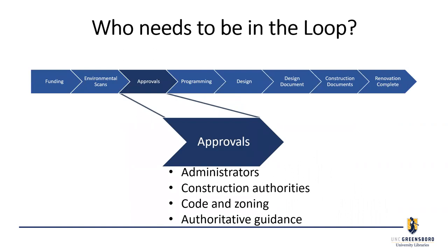The next step is approval, and we're going through that right now. The master space plan was driving a number so we could see what was needed and present to the chancellor what we need to renovate and expand the library. It worked — he approved it and made it our number one capital priority for this campus. That then went to the state legislature.